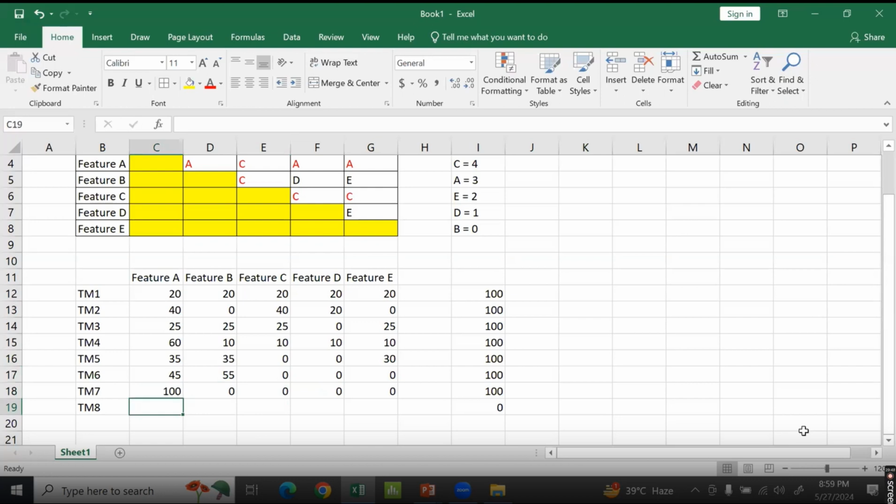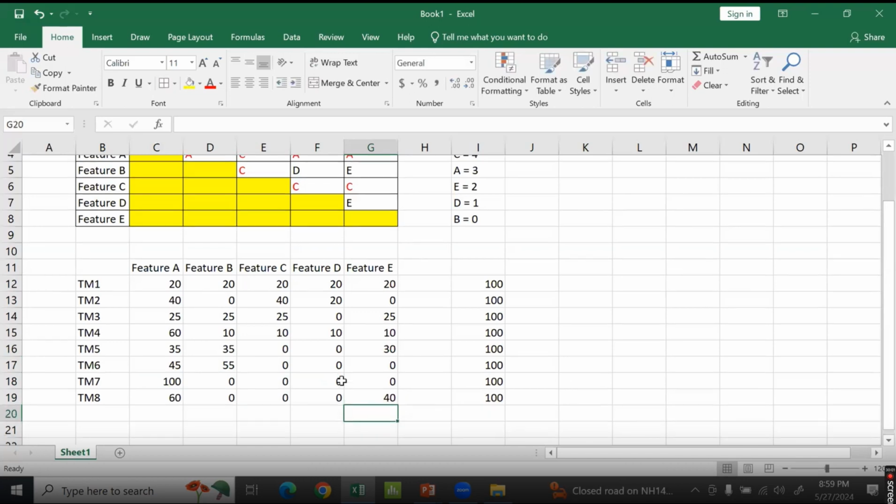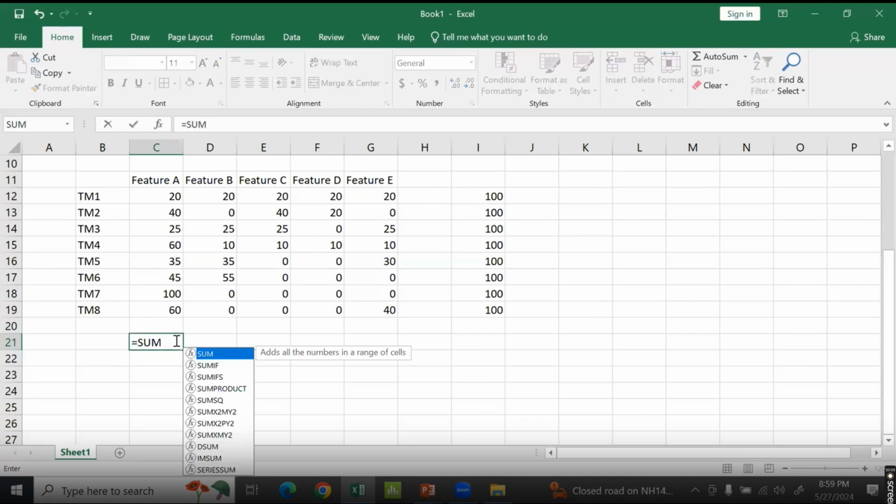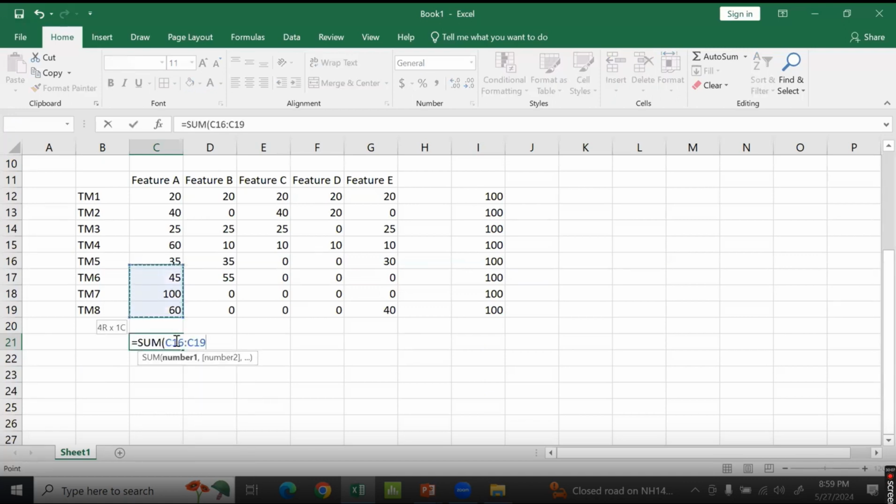Absolutely possible, which is where it becomes wrong. But again, you don't decide anything here. Well, we can't decide anything. Like this is like 40 here. This is what we call the 100 points method. You know what will be done? We'll just take a sum. We will see which feature got the maximum point and maximum score from the people who are rating.